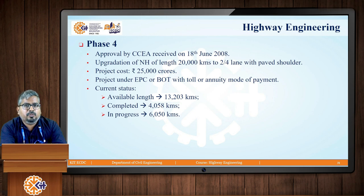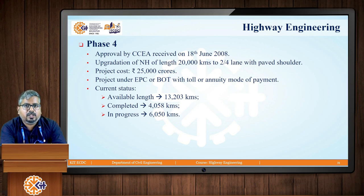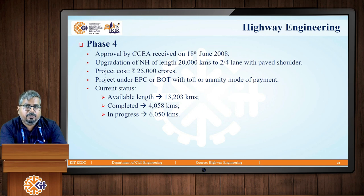EPC stands for Engineering Procurement Construction, while BOT stands for Build Operate Transfer. There is a basic difference between these two models. In the BOT model, the government assigns work to a private body, which has to finish it and hand the project back to the government, with payment made only after it enters commercial use. In the EPC model, the government makes payment for whatever cost is incurred from the very beginning of the project.